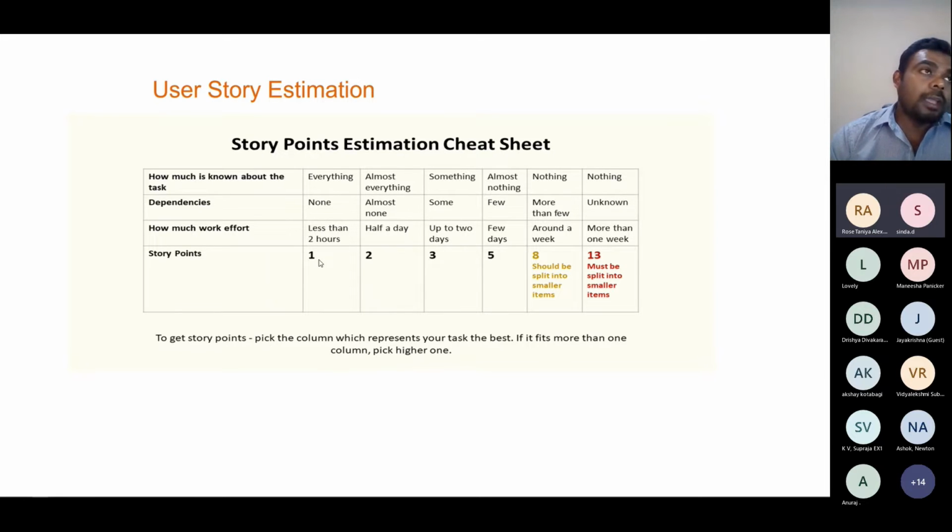In the 4th sprint, we can say, okay, our velocity is 5. Based on that, we can commit. We are not going to commit more than that, but we can try to improve our velocity. Maybe sometimes you get 3 as well. That's why I'm saying you have to take the average for all the 3 sprints and come up with the value that is called velocity.